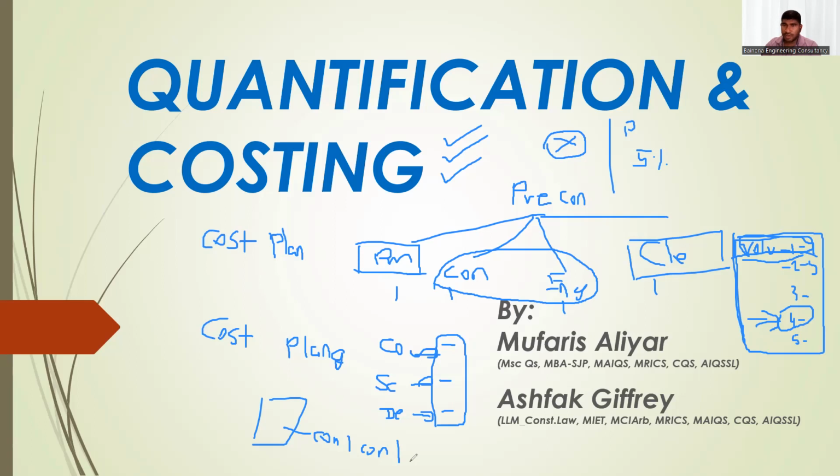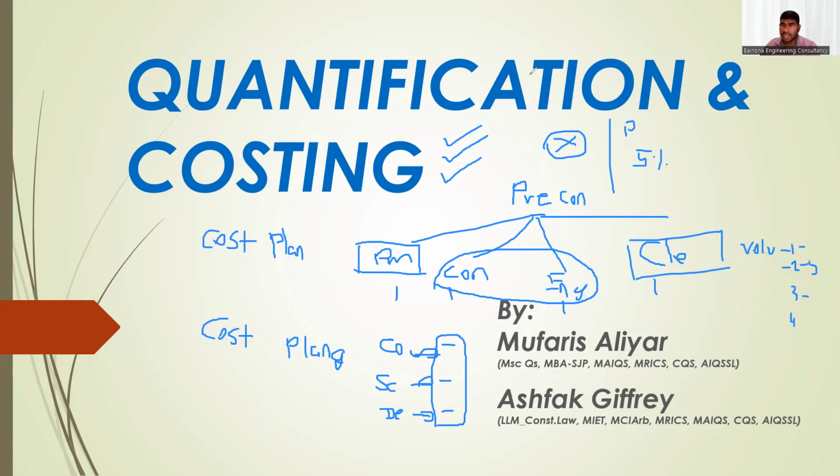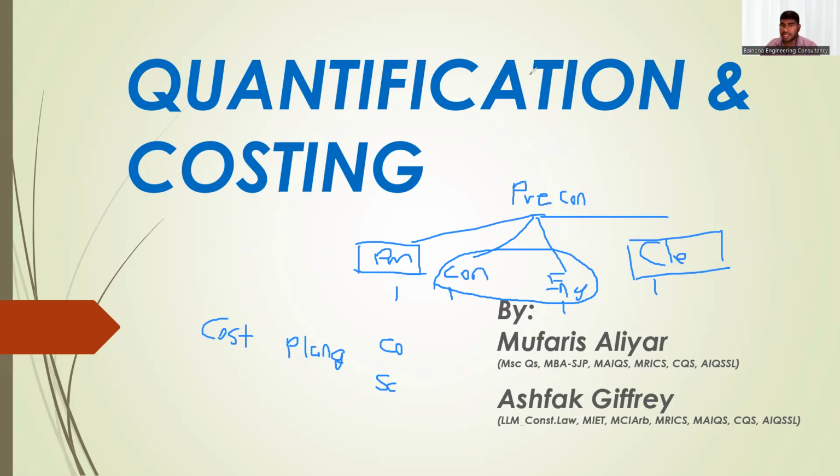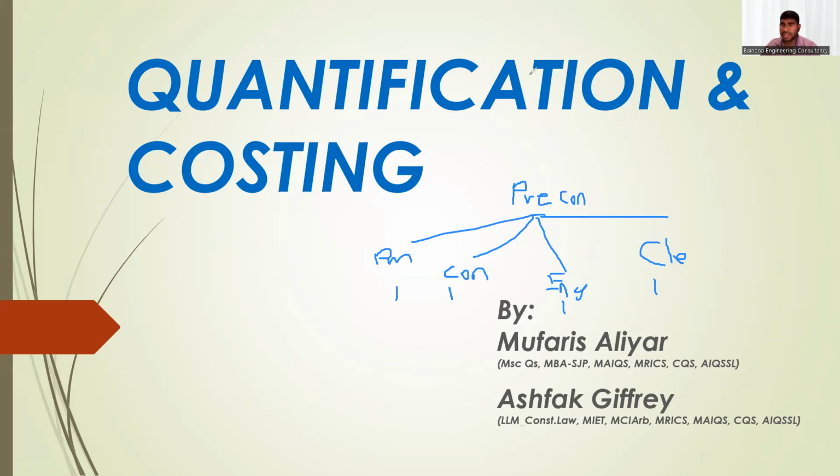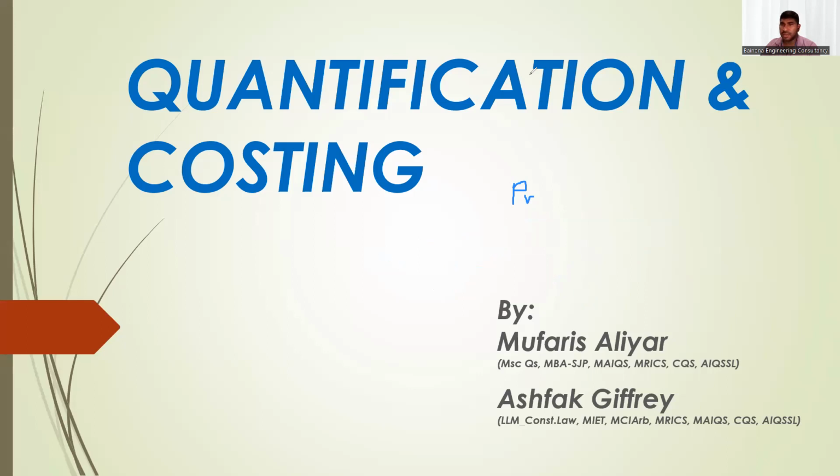So now we see the duty of the consultant, client, and contractors in the pre-contract stage. As we saw last time, in the pre-contract stage comes this tendering phase, where the estimator and the quantity surveyor take the quantities, the estimator prices the project, and finally they submit the tender. They come for post tender meetings, negotiate, finally agree the price and award the contract.